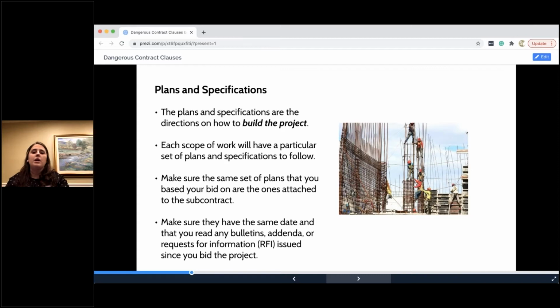Now you're kind of in a pickle here because the plans added extra specifications that are not necessarily what you do. To give you an example from one I had just recently, I had a client bid for a certain type of landscaping, and they knew what they were doing as far as certain pieces around certain buildings. And yet when it came to the actual plans, it added, I think it was probably 3 times as much work that had to be done. And so that created an issue for my client because the price was too low.